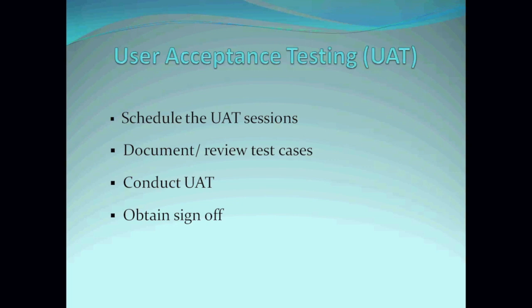Make sure you give them enough notice, because I will not be happy if a BA puts a UAT session in my calendar with just 24 hours notice. That's not proper. Just like when you are trying to schedule your interview or workshop, you need to give them enough notice. Ideally at least 1 week, to be honest, but most times I do 2 weeks.